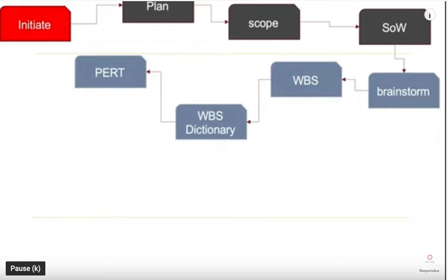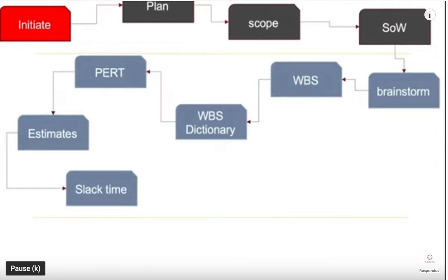Okay, the PERT chart is really helpful, and it has all the estimations, especially time. Cost estimations are usually in the WBS. In PERT, we only have the durations and estimations for activities, right? And then using these estimates, using Simpson's rule or some historical data, your experience, focus groups, looking at what the company did in the previous projects, you come up with the expected time.